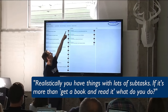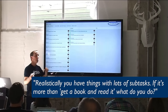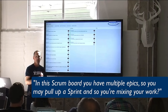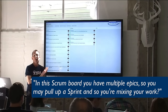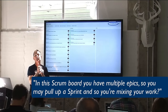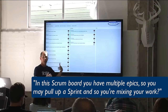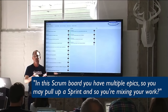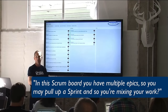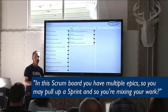In this view, I'm really only concerned about what I'm supposed to be doing by next Friday and what I'm actively doing right now. At the very top there are quick filters — you can see only your issues or recently updated ones. You can create additional quick filters to show things of a particular type. What I'm attempting is to make sure that with each sprint I'm advancing all of my epics a little bit. In a developer's world, they might want to focus on one epic, knock it all the way out and move on to the next. In my context, I'm trying to evenly distribute my work across all the channels I need to support.